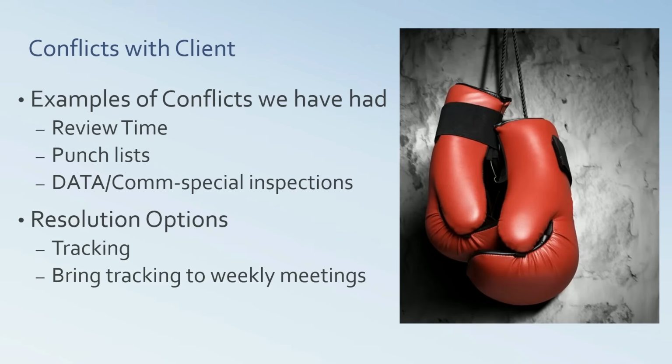And they'll say things like, well, this is a base standard and they missed this and this should have been in there. This is our base standard. Well, I'm sorry, I understand, but we signed a contract, we meaning your GC or sub that you work for, and what's in the contract we have to provide, and what's not in there would cost money, and that's a change order. So that brings up a really good point. When it's a base standard that wasn't caught in an approved design, right? Then that is not your fault.